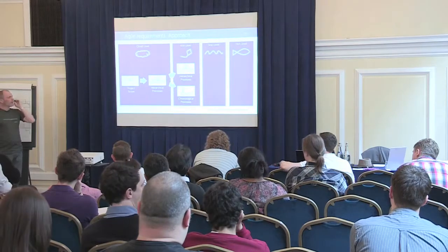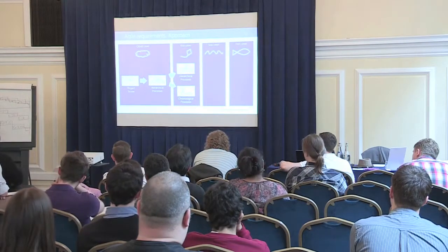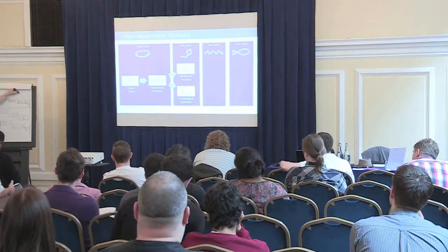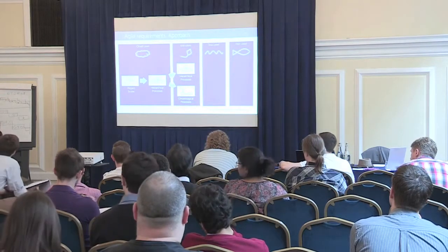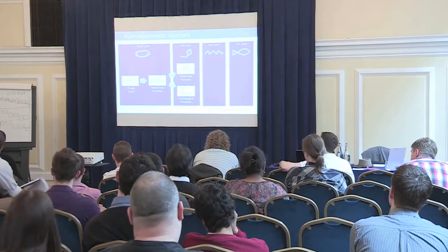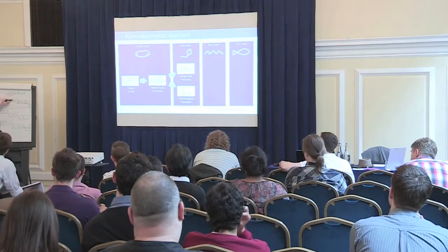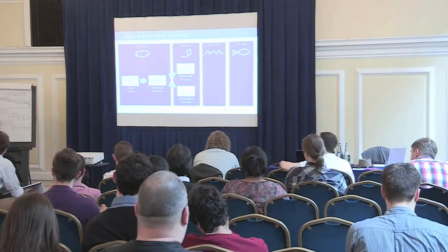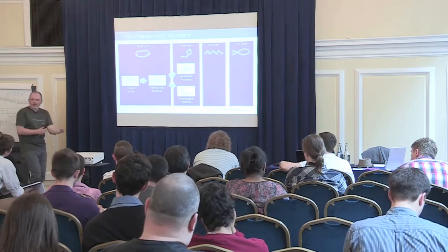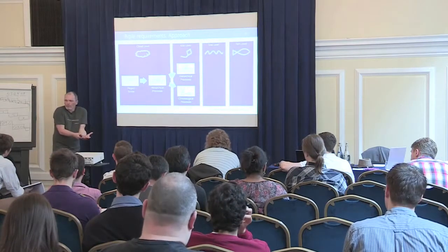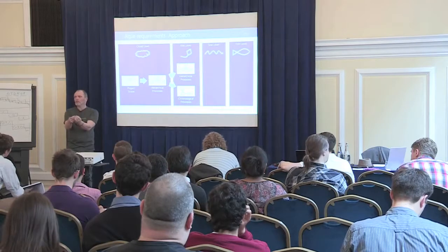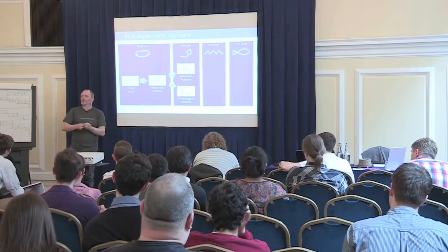And they are easy to recognize, because there is a very simple guideline for looking at this. It's called ODOPOP. Not sure if you ever heard of this acronym. You haven't? Well, you should. It stands for one time, one place, one person. So if a particular process is executed at one point in time by one role at one location, then you probably have an ODOPOP process or an elementary business process.